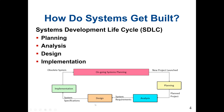After the system requirements, we move to the design phase. This is the phase where we design the system, and our product will be the system specifications. Then after we have the system specifications, we can implement and develop the system using a computer programming language. After that we do testing, then we put the system into operation. We shall go through each of these four phases in detail.